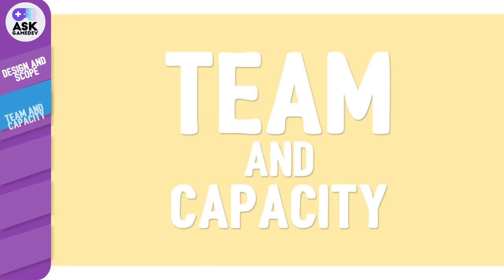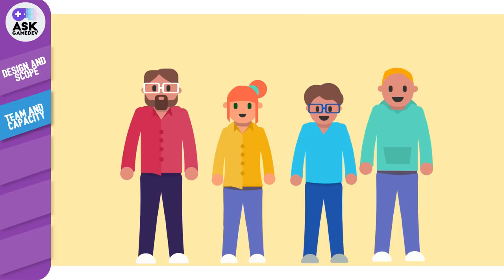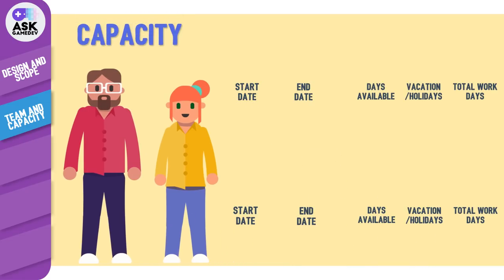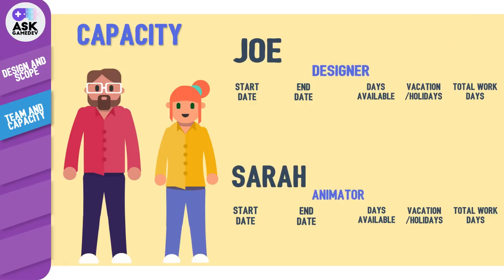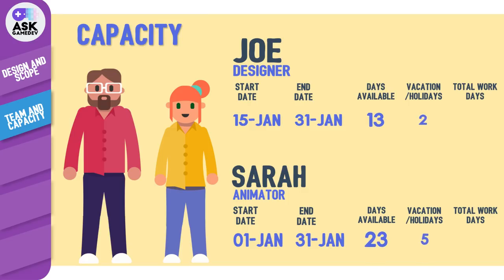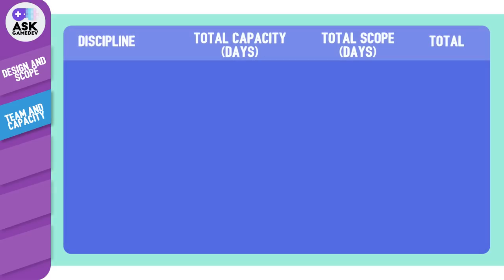Next: team and capacity. Now that you have your scope defined, the next task is to detail your staffing plan to address that work. This involves listing all of your proposed team members, when they can start work on the project, and when the team plans to be at alpha or feature complete. This is your development period. Once you have those start and end dates, you'll want to calculate the amount of work days within that period while accounting for holidays and any non-work days. This is your team capacity.